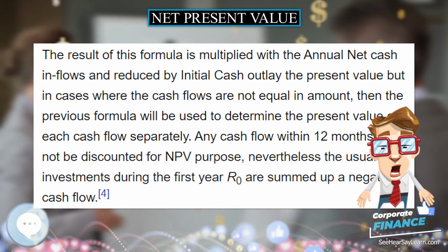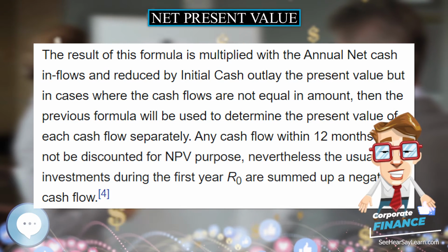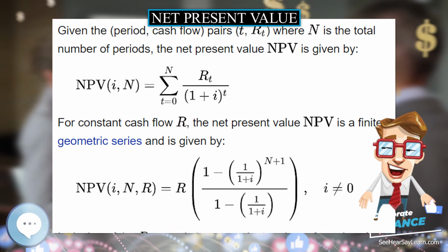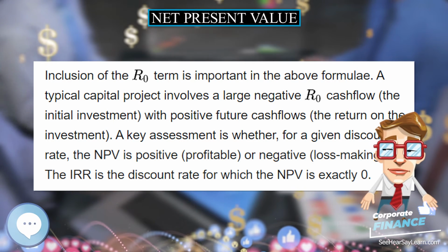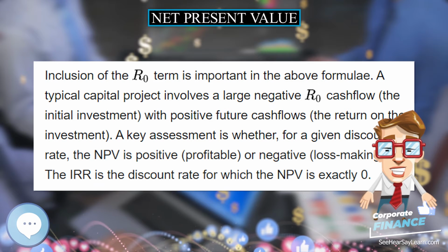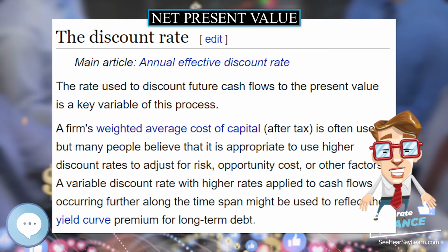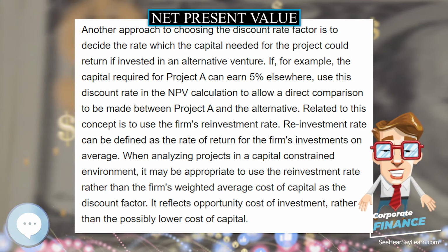When the cash flows are discounted, however, it indicates the project would result in a net loss of $31,863.09. Thus, the NPV calculation indicates that this project should be disregarded because investing in this project is the equivalent of a loss of $31,863.09 at t equals 0.